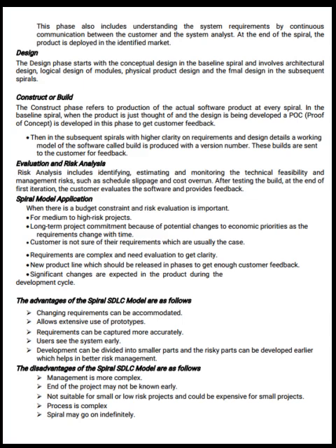Now let us see the advantages of the spiral SDLC model. Changing requirements can be accommodated, and it allows extensive use of prototypes. Requirements can be captured more accurately. Users see the system early. Development can be divided into smaller parts and the risky parts can be developed earlier, which helps in better risk management.